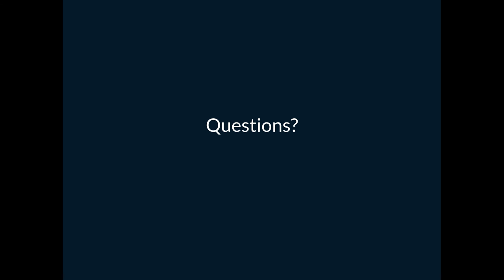The question was, if you get to five and you haven't gotten to what they wanted because the deliverables hadn't been firmly established. In that example, we definitely could have known that we could have installed the modules in 5 hours. So we should have said that's what we're doing, installing the modules, and that way there's no issue. You can't be completely open-ended about it unless you have a client that's totally agile and totally on board. You do have to establish some boundaries, exactly.